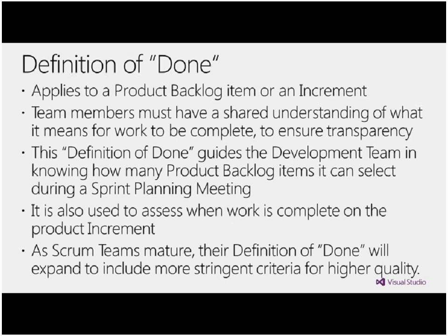That is, the definition of done evolves, right, as you go through the process of delivery. So in the initial releases, you might have just a couple items as part of the definition of done. But for instance, at Microsoft, they add a lot of items, like you have to pass the localization tests, you have to pass a lot of tests. Now, how does TFS enable you to enact the definition of done in your Agile process?